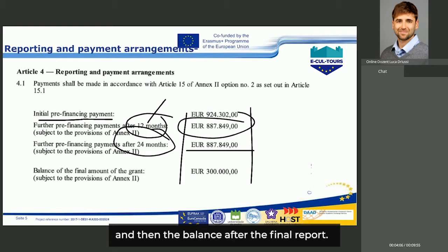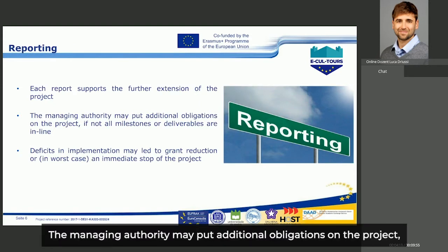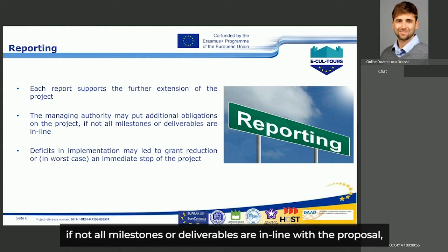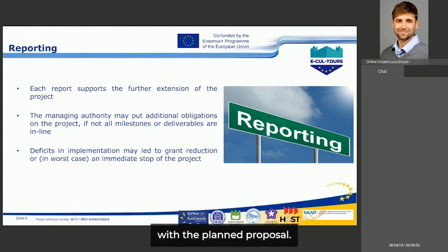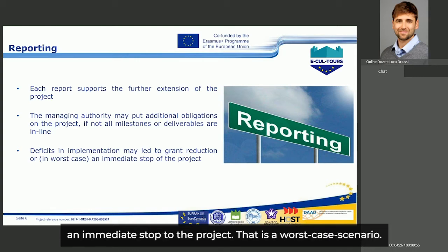after the final report. The managing authority may put additional obligations on the project if not all milestones or deliverables are in line with the planned proposal. Deficit in implementation may lead to grant reduction or, in the worst case, an immediate stop to the project. That is a worst case scenario.